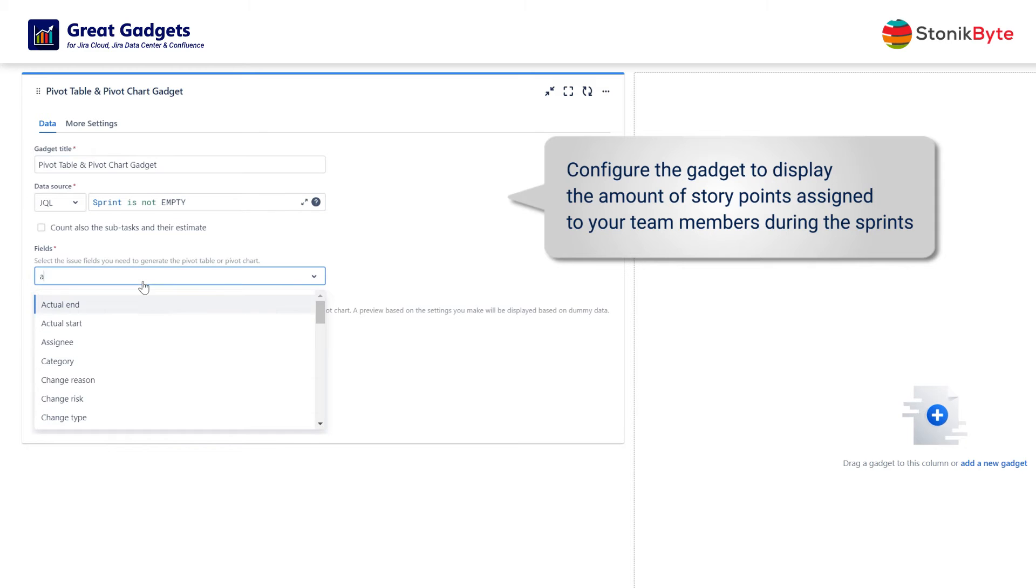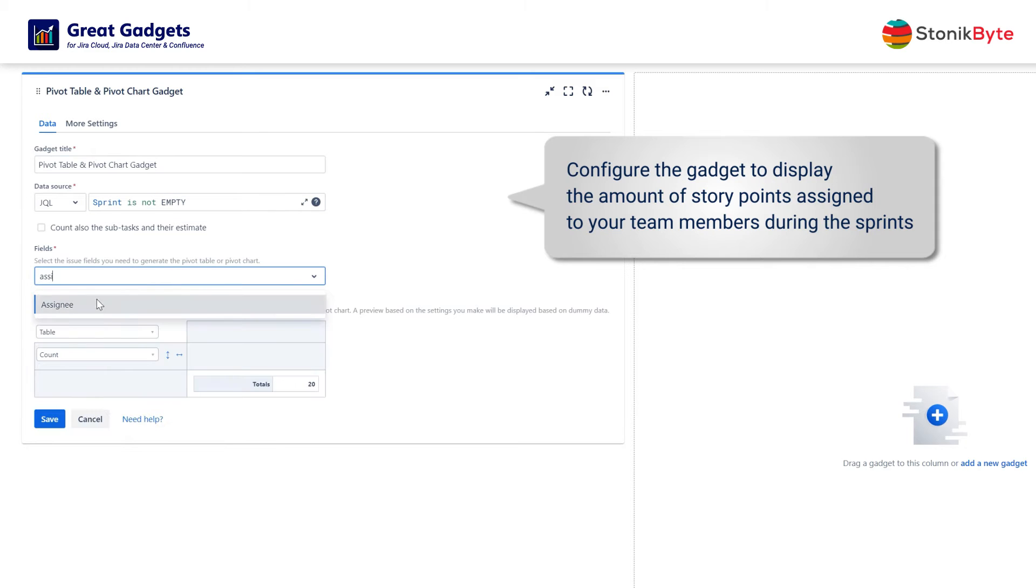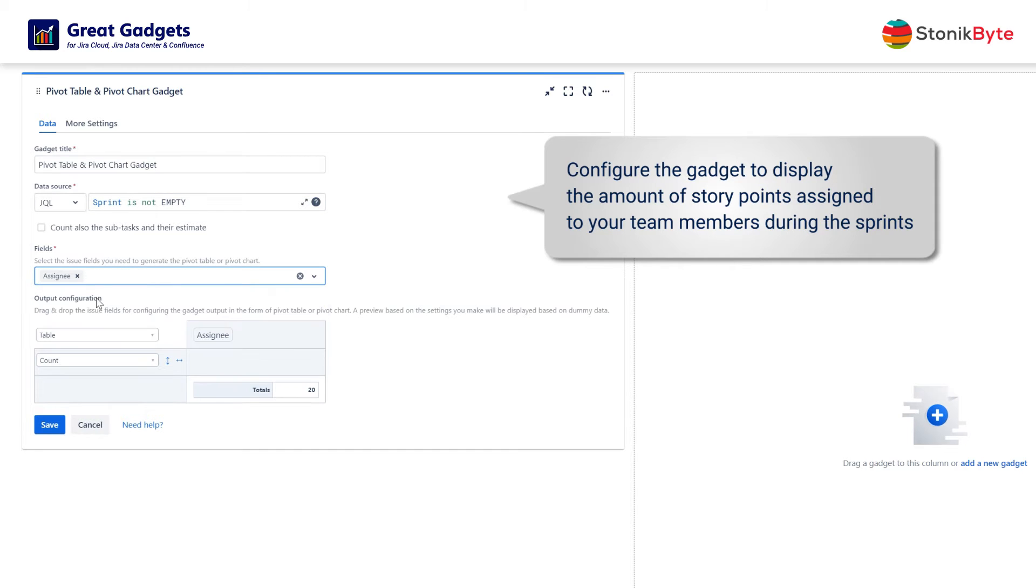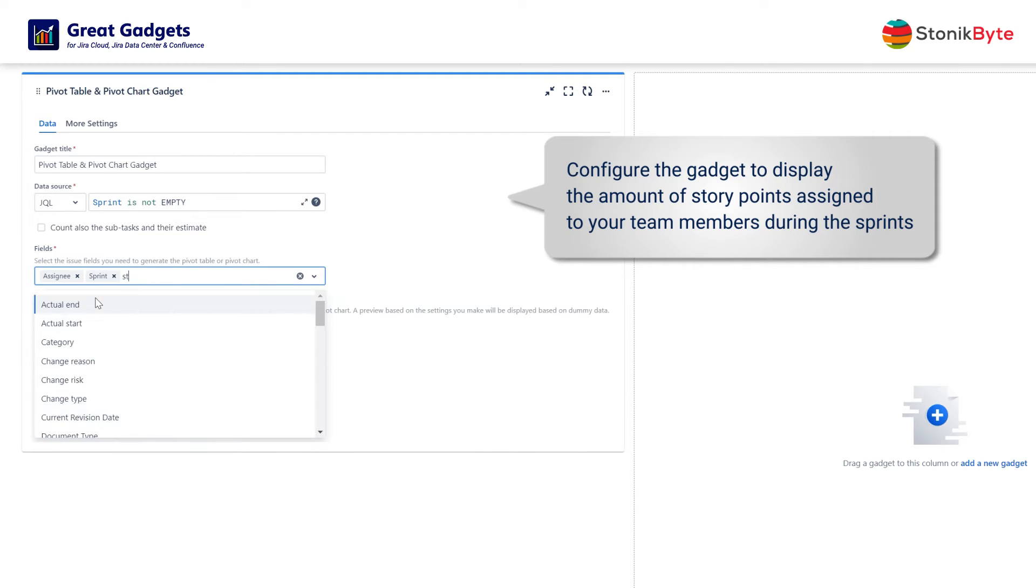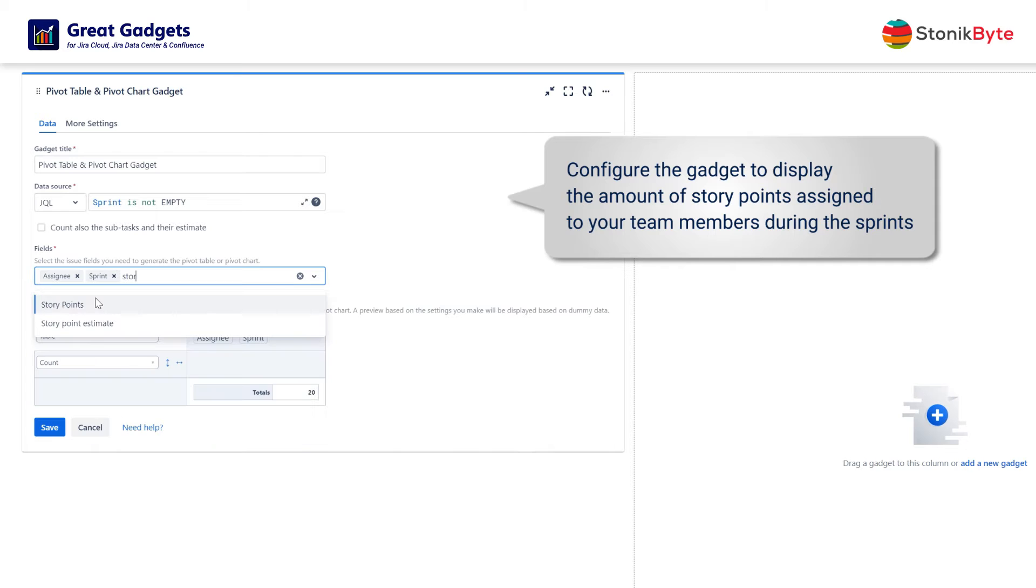At Fields, select the issue fields needed for this statistic. In this case, we need Assignee, Sprint, and Story Points.